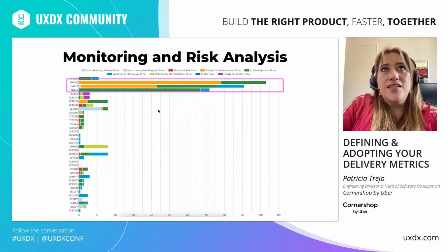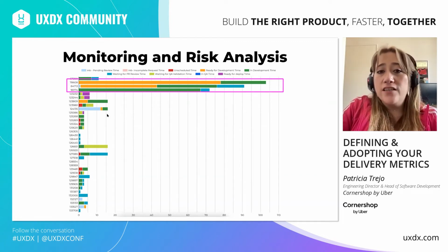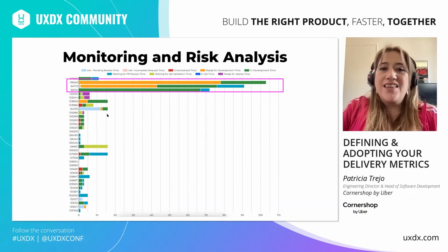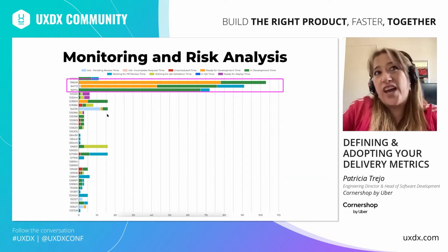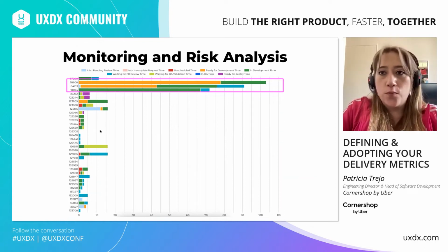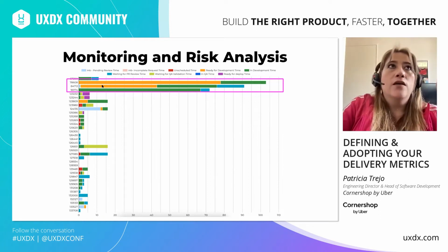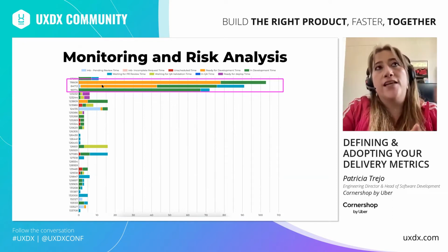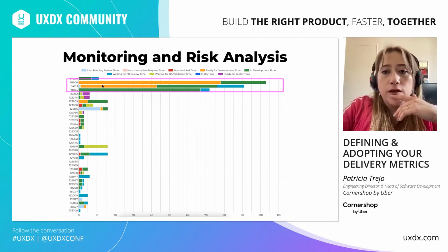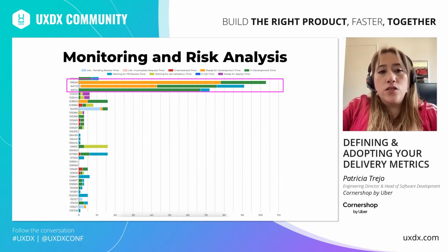Yes, this is a super weird behavior, and the cards that come later have much more normal behaviors, right? They have a life that does not exceed 5 days in general, except for some that reach up to 20 working days, but they're much smaller than the other ones in terms of their lead time, the time from when they left the backlog until they reached production.